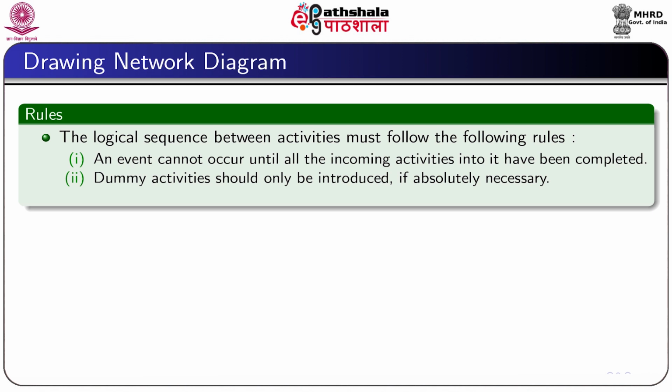We have to maintain the logical sequence or interrelationship between activities by the following rules. An event cannot occur until all the incoming activities into it have been completed. And secondly, dummy activities should only be introduced if they are absolutely needed.